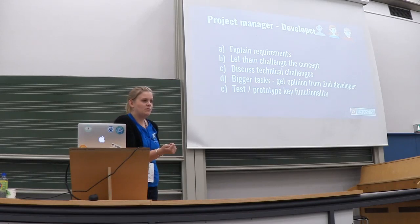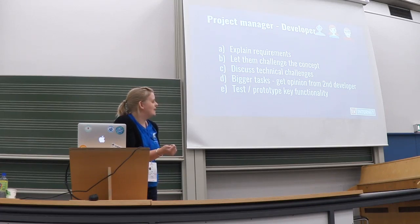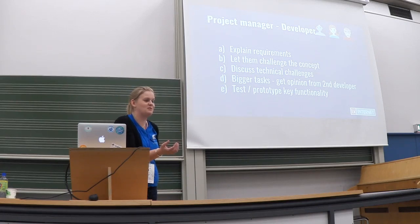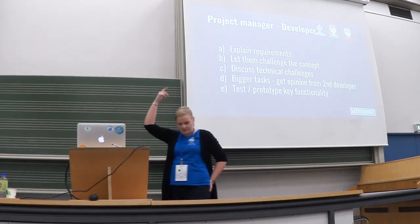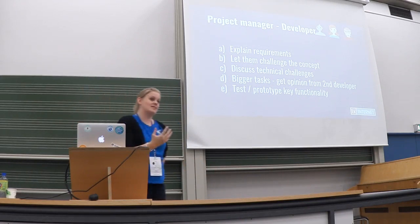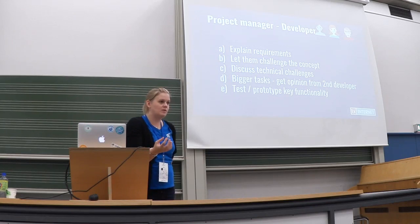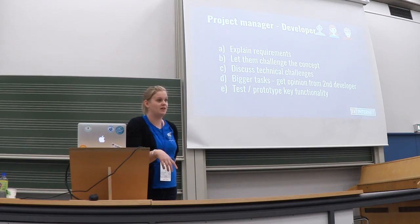What has been really helpful for us in the estimation phase is to test and prototype key functionality. This can take a while, but it is definitely worth it before you start selling to the client. You have to be careful that you can actually spend this time. If we're talking about certain facets in the search that nobody of us has done before, it is definitely worth letting the developer have one or two days of testing whether it is possible — so it will not come back to bite you later in the process.